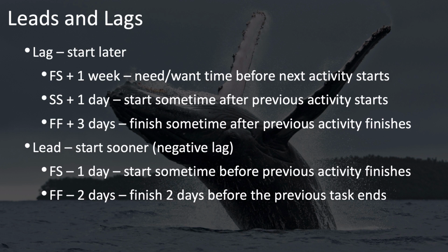Suppose, for example, you have activities A and B with a finish to start relationship, which is the most common, but you either need or want to have some time between the finish of activity A and the start of activity B. This could be, for example, if you have a foundation that you're pouring for a house, and that foundation needs some time to cure before you start building the walls on top of it.